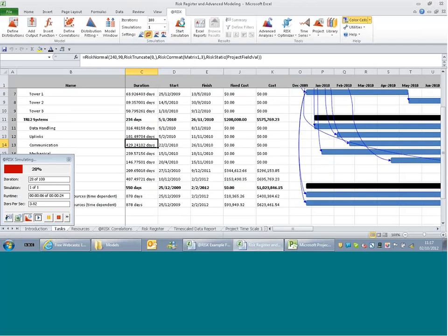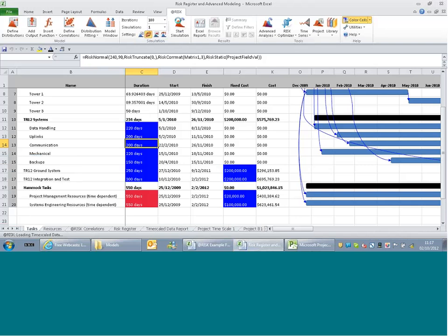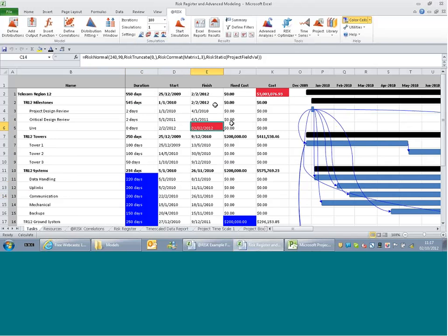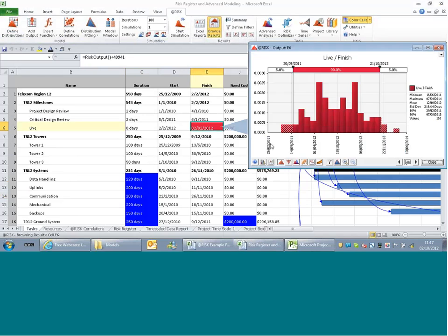Whereas with the cost estimate model I showed you, we were looking at the actual costs, now I'm using @RISK to give me some schedule risk analysis. So this is actually looking at when a particular project is going to finish. Instead of finishing on the 2nd of February, if we look at the results, now we have a distribution of values for our finish dates.